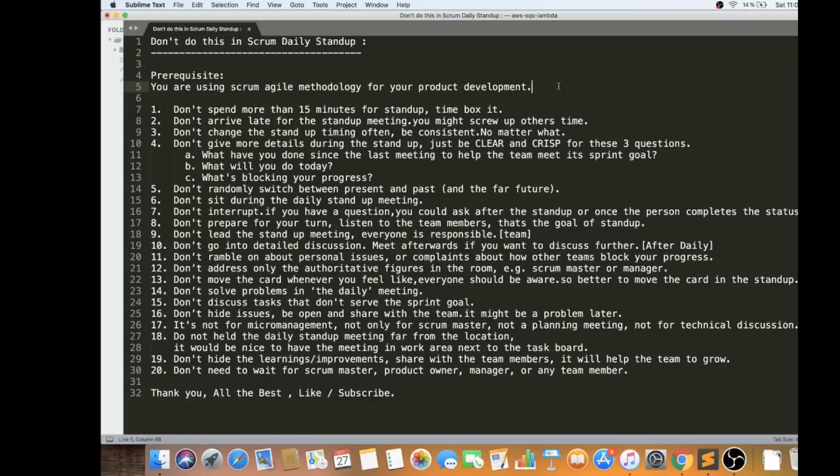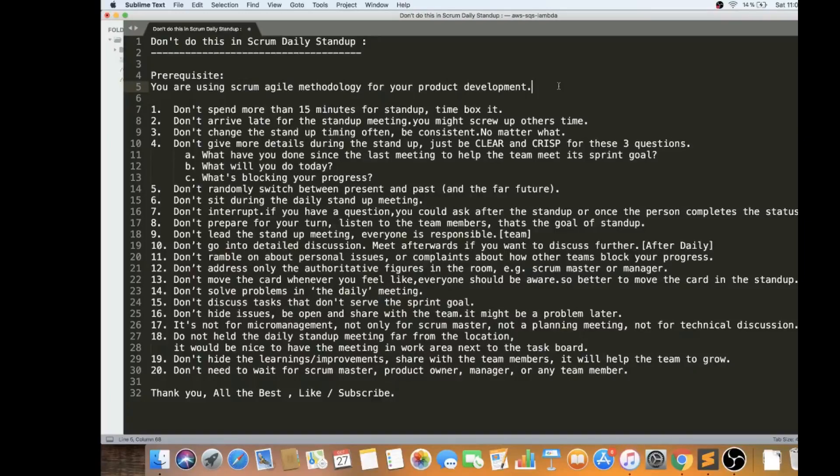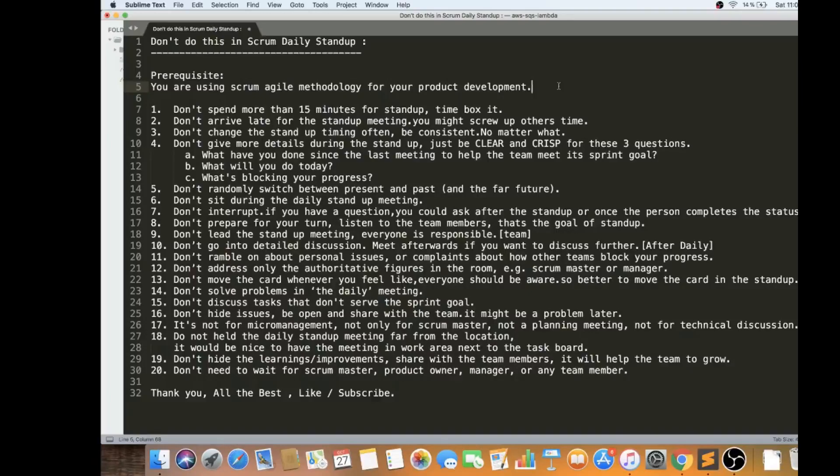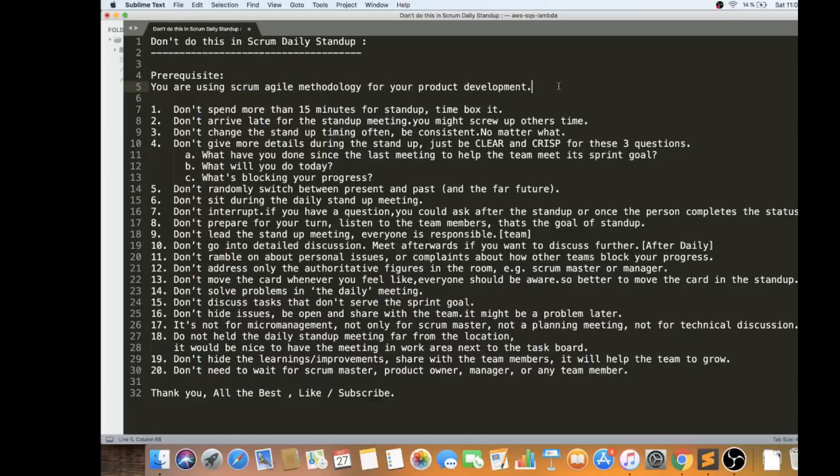If you are using Scrum, obviously you will be having a daily standup. What you should avoid: don't spend more than 15 minutes for standup. Please time box it. Always the entire team should have the consciousness that we should not go beyond 15 minutes, then it will be a normal meeting which has a lot of discussion. Please time box it, always have 15 minutes for the daily standup meeting.